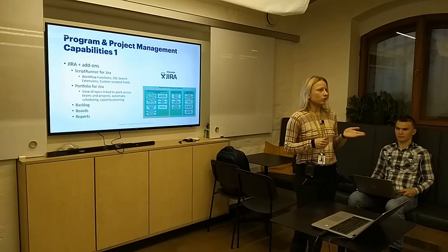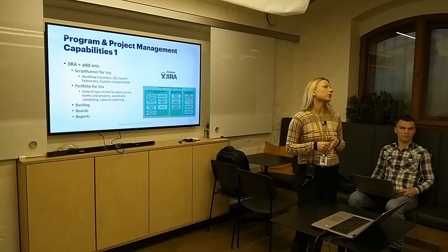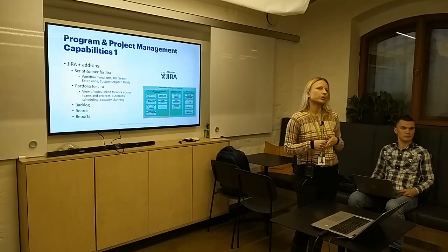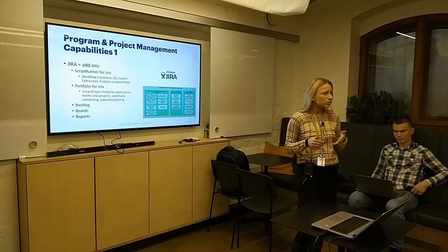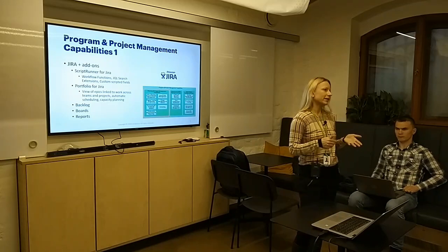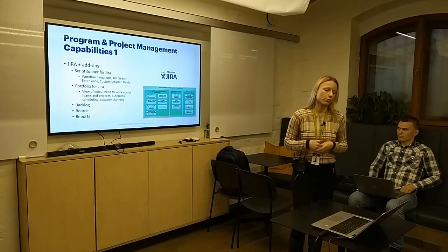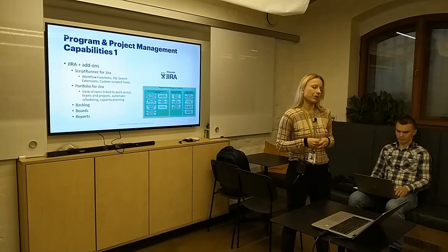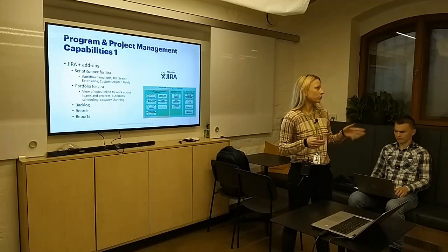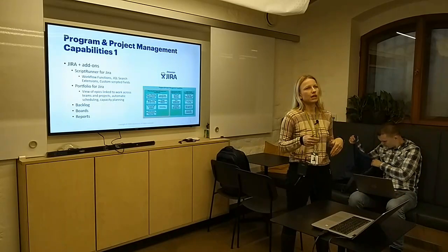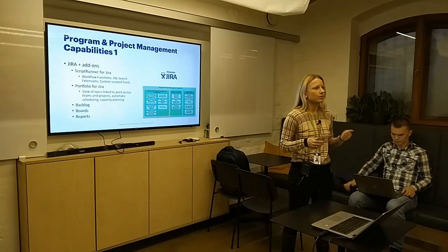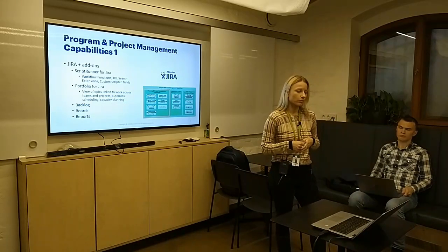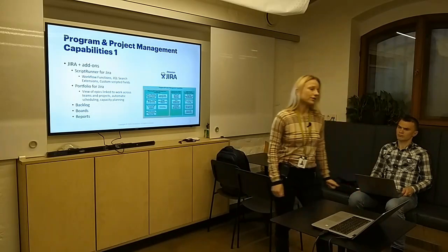Script Runner is not free, and it is a great additional option with functions where you can, for example, have a custom field and calculate its values according to your need based on the input in other fields. So this is highly used in the boards to calculate, for example, the importance of the tickets, how quickly the program management would take them into the plan. So many values needed for estimations are calculated with Script Runner for Jira.